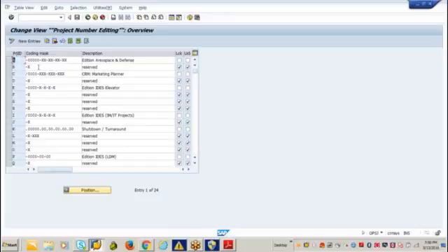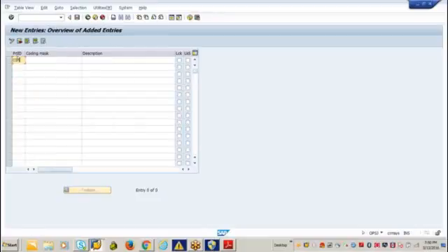Yes. So in my example, if it is a capital project, CAP, and if it is a customer project, CUS, then here you need to type that. Suppose here CUS, and then the client will give their coding mask in discussion with you. So you will arrive at a particular coding to be given. Suppose it should start with customer hyphen, and then they want 3 digits for the project number. So it should start with 001, and up to 999 I can create, right?